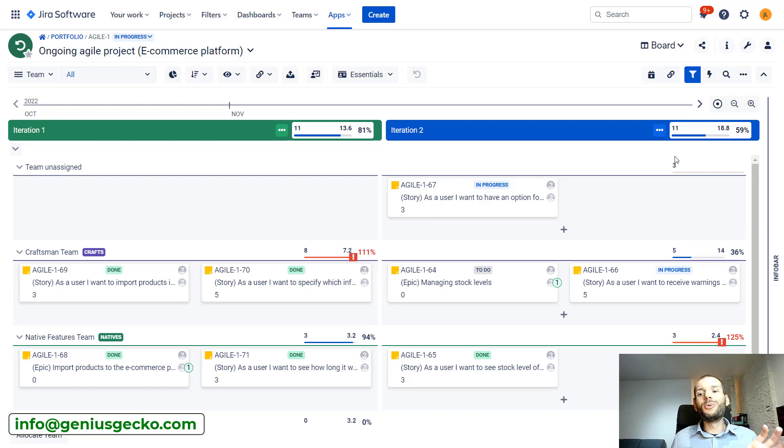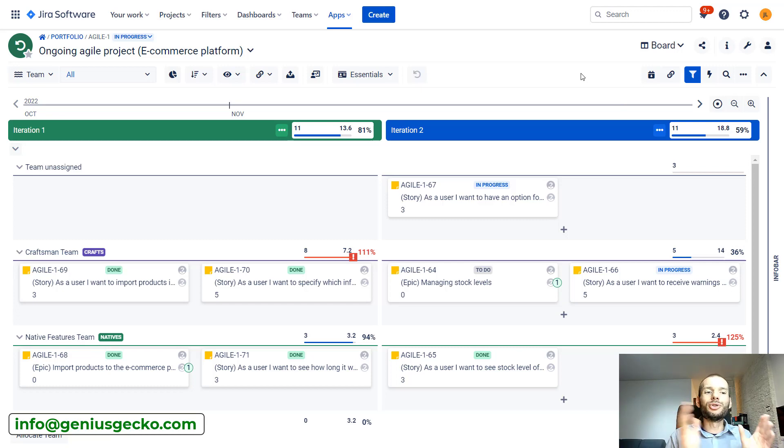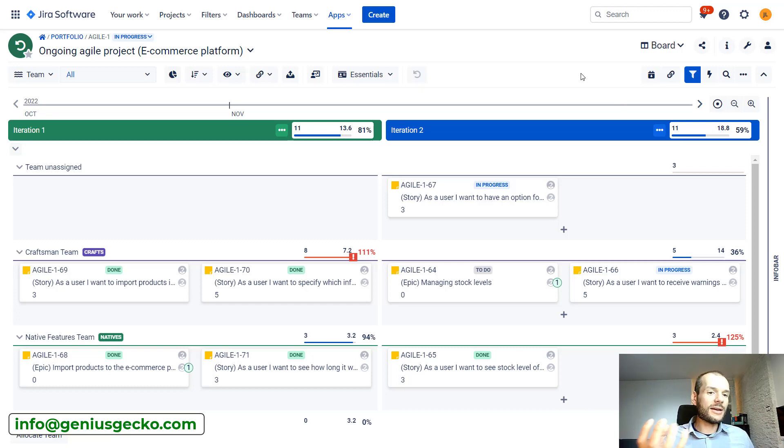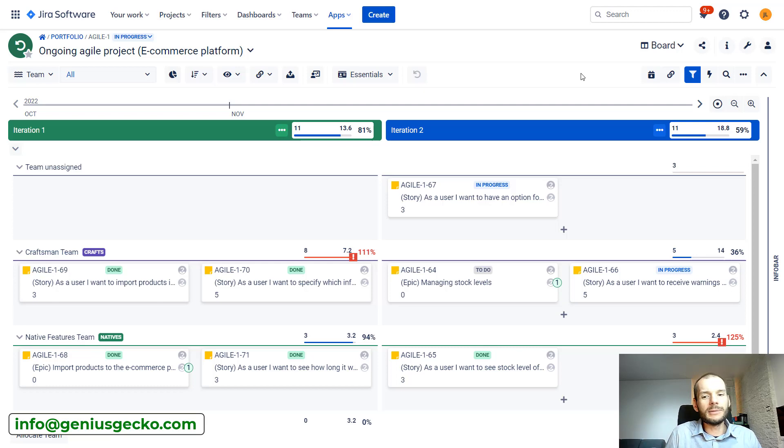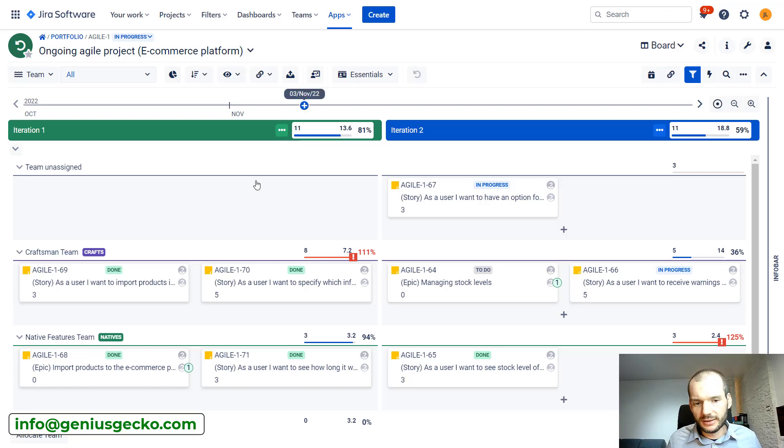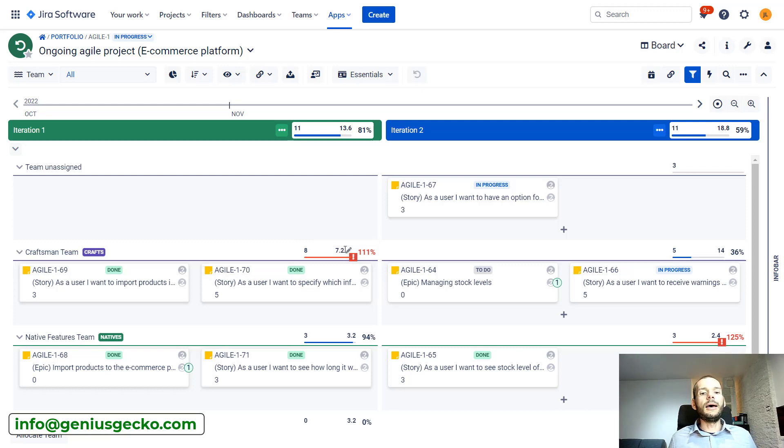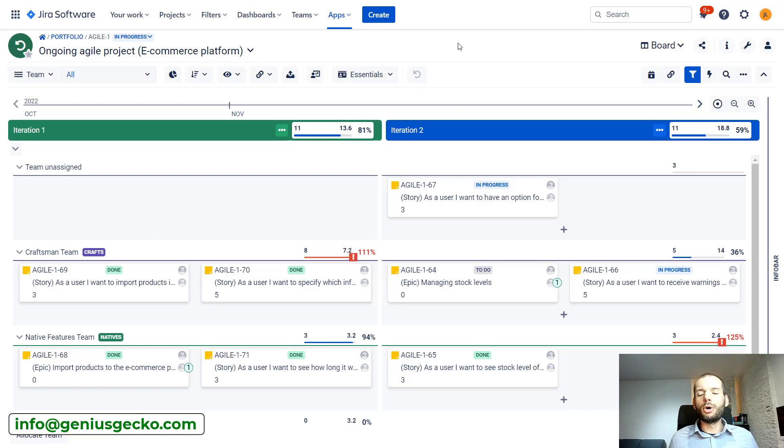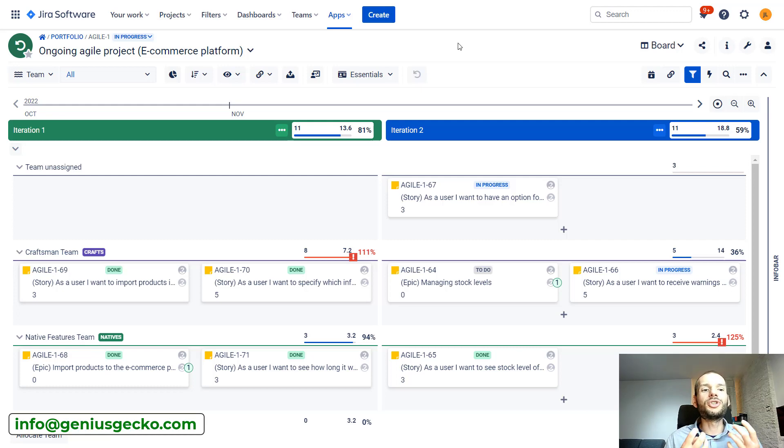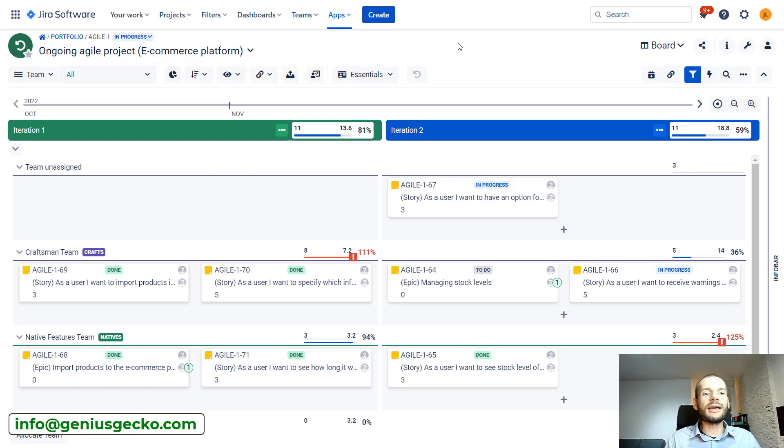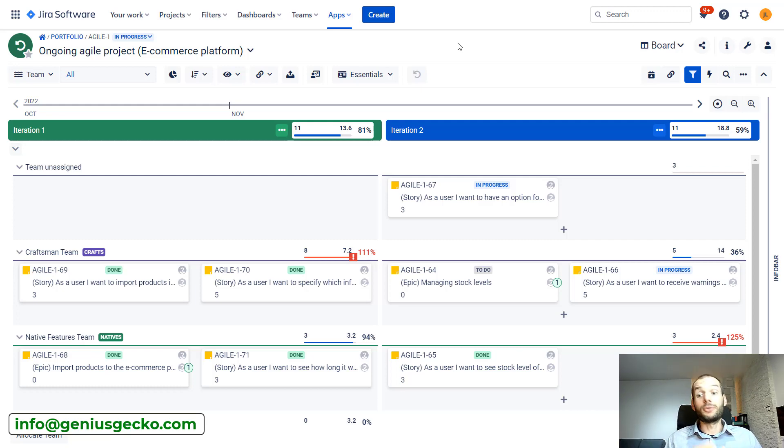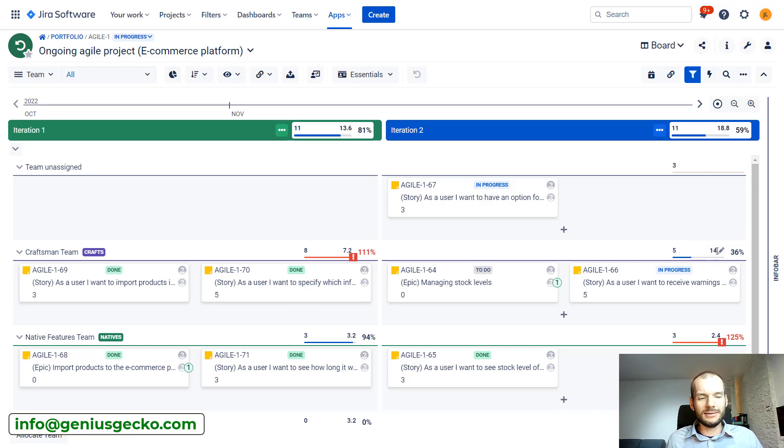So if you want just to rely on this calculation, time to story points, this is pretty nice because it actually reflects reality. A person is not working, their capacity won't be included in the team. But in some cases, people or scrum masters do not want to change the capacity of the team, especially if it is just like one or two days that a person is off. And remember, even those small changes would impact this number if we will just rely on calculation.